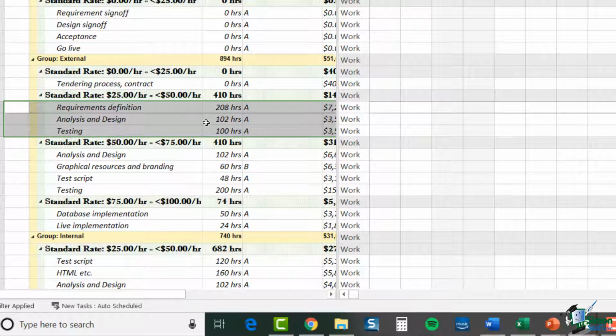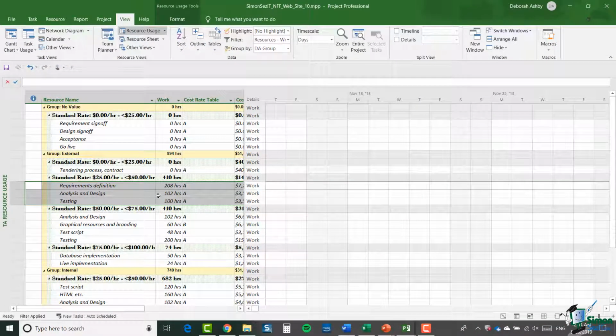So in that sense, you've sort of filtered tasks according to a resource grouping, but it's only in a sense, shall we say. Having said that, it can actually prove very useful to be able to use a grouping and apply it to assignments, either to the assignments within Resource Usage View, or if you're working on tasks and grouping tasks, you can use the same approach in Task Usage View and group the assignments in task usage according to a task grouping definition. So that's it on grouping.